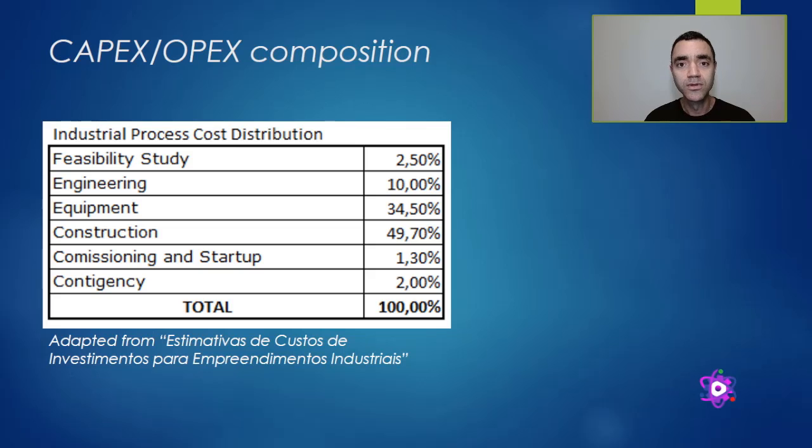So I can, for instance, use that value as my basis, and based on that, do the distribution of the other costs in my cost summary. This is another way to do the preliminary cost estimation. Again, this is only to let you become familiar. In each real-life case, you verify what makes sense or not.